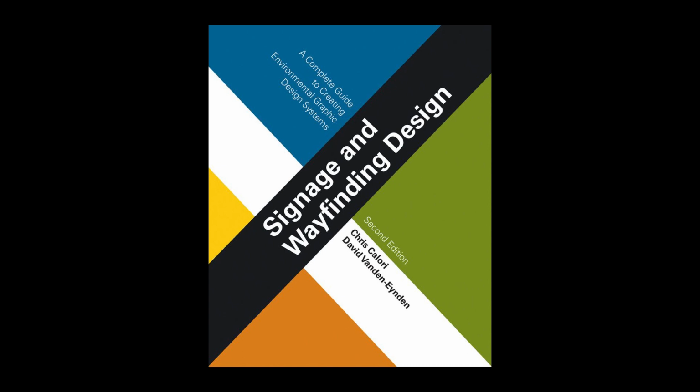Many publicly funded projects, however, require open bidding without regard to pre-qualification. In such public funding scenarios, the qualification requirements of the technical signage specs become essential for eliminating unqualified fabricators that have submitted bids. The designer's role in the qualification process may be as simple as providing a list of sign fabricators with whom the designer has previously worked as potential bidders for the project, usually a minimum of three, or